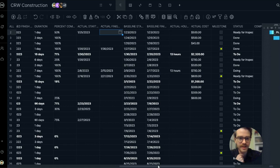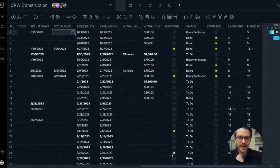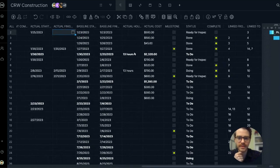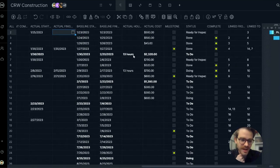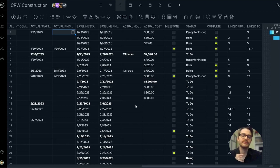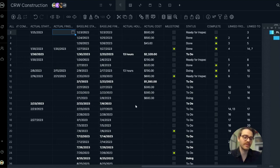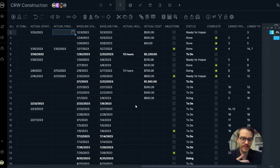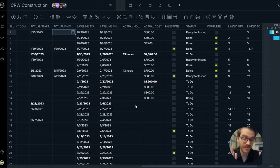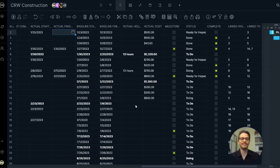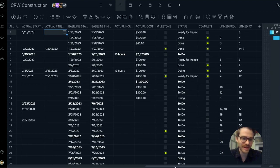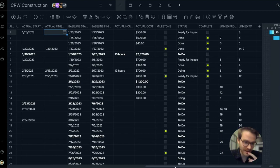Continuing on, we can see more actual data, actual hours that were spent on the task and actual costs. Of course, this is great for tracking, but this is also crucial for estimates. Once your project is over, compare what you thought was going to happen versus what actually happened. So next time you need to make an estimate for a client, you have the data to back up your proposal.